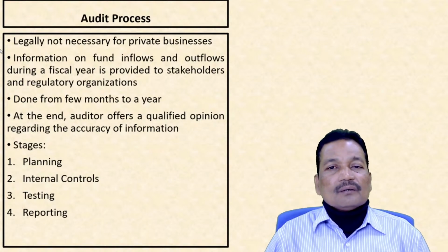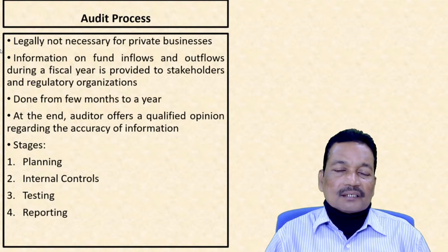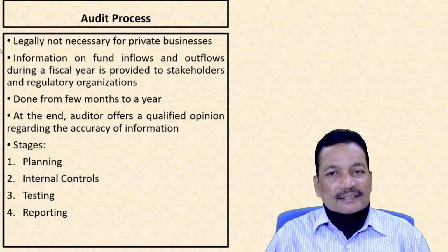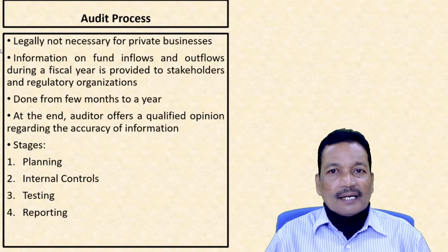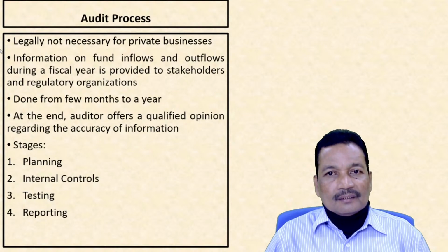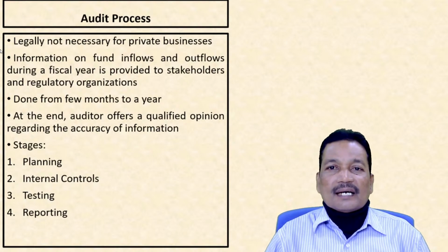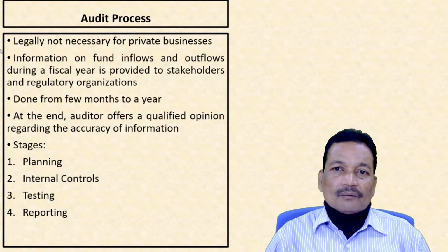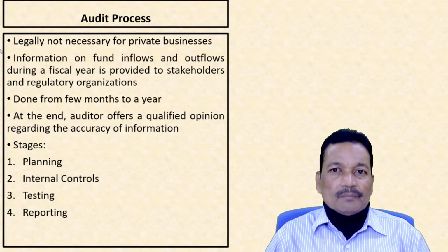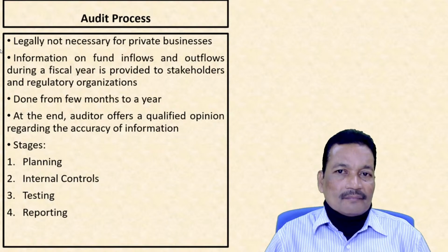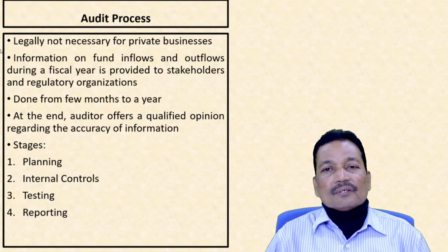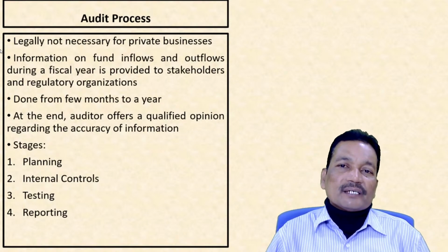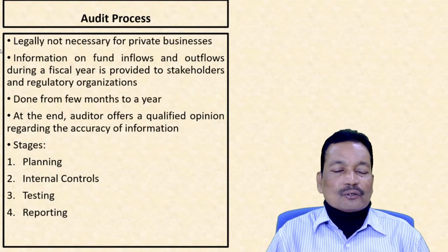Deviation means whether the actuals are differing from the planned activities. Now, if the deviations are there, we try to see whether it is positive or negative. If it is negative, then what kind of steps we shall take to reduce the deviation, called as control activities.